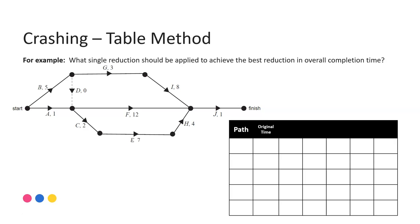Let's look at a second example of the table method. We've got our project network and we need to find what single reduction should be applied to achieve the best reduction in overall completion time. Our first step is to note down all the possible paths from start to finish. The first path is B, G, I, J with a length of 17. The second path is B, then the dummy, F and J — you don't need to write the dummy — and that path will be 18.